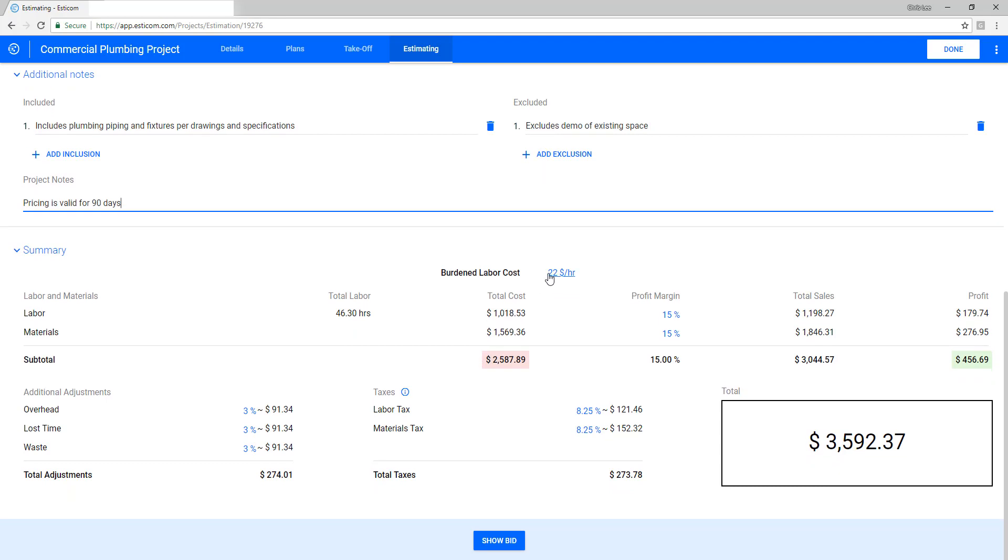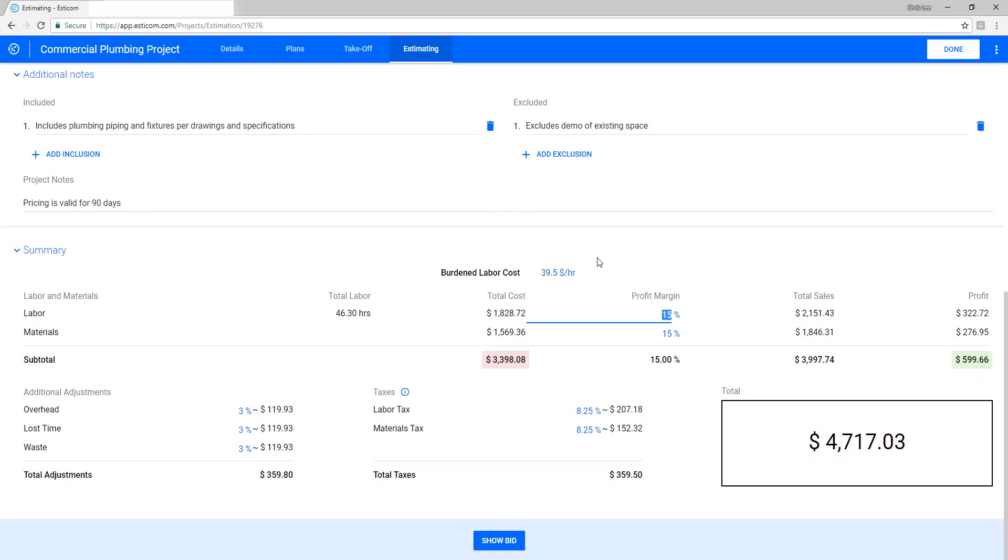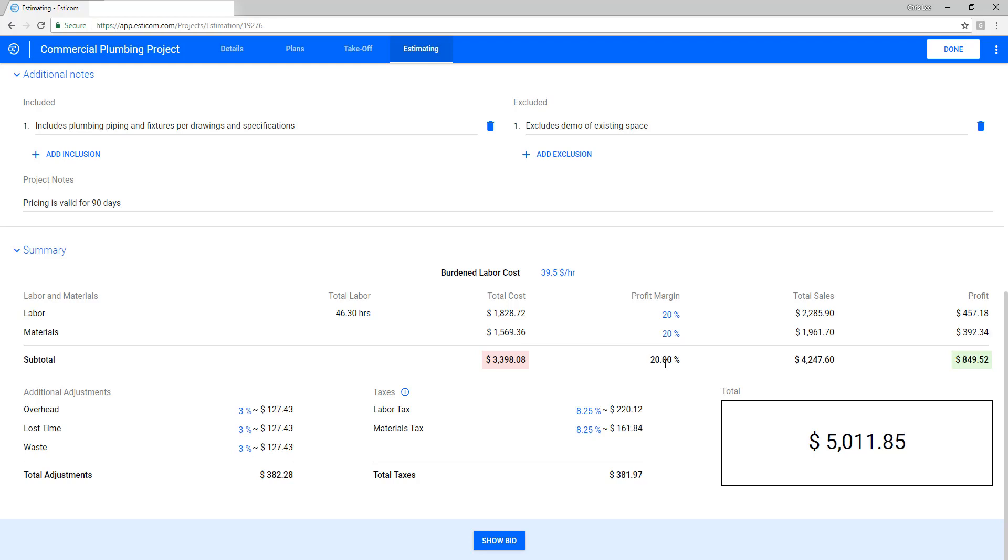Now let's adjust our burden labor rate for the project which is used to calculate our labor cost and then adjust our labor and material profit margins. Here you can see the projected cost and profit and below you can adjust your overhead, lost time, waste, and any taxes.